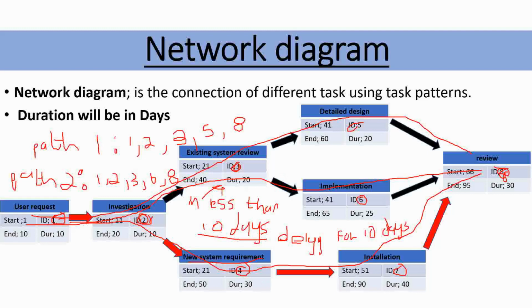So its slack time is 10 days. Even if you delay it, it doesn't change the overall completion of your project. I hope you understand me there.